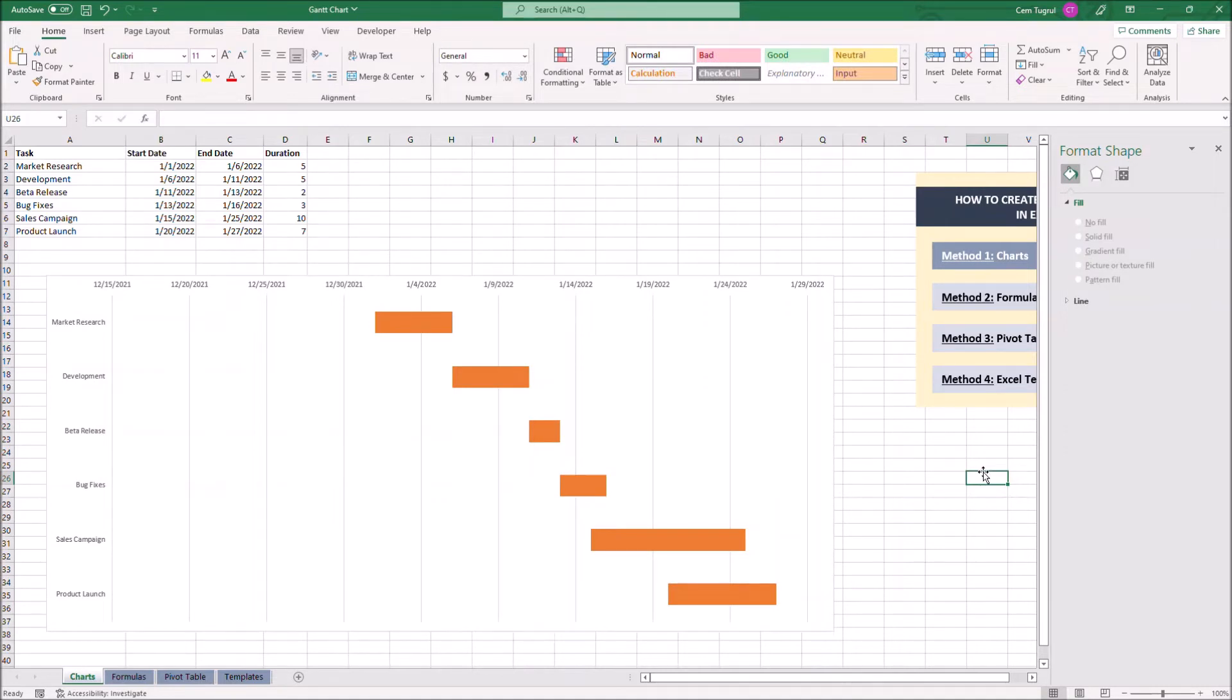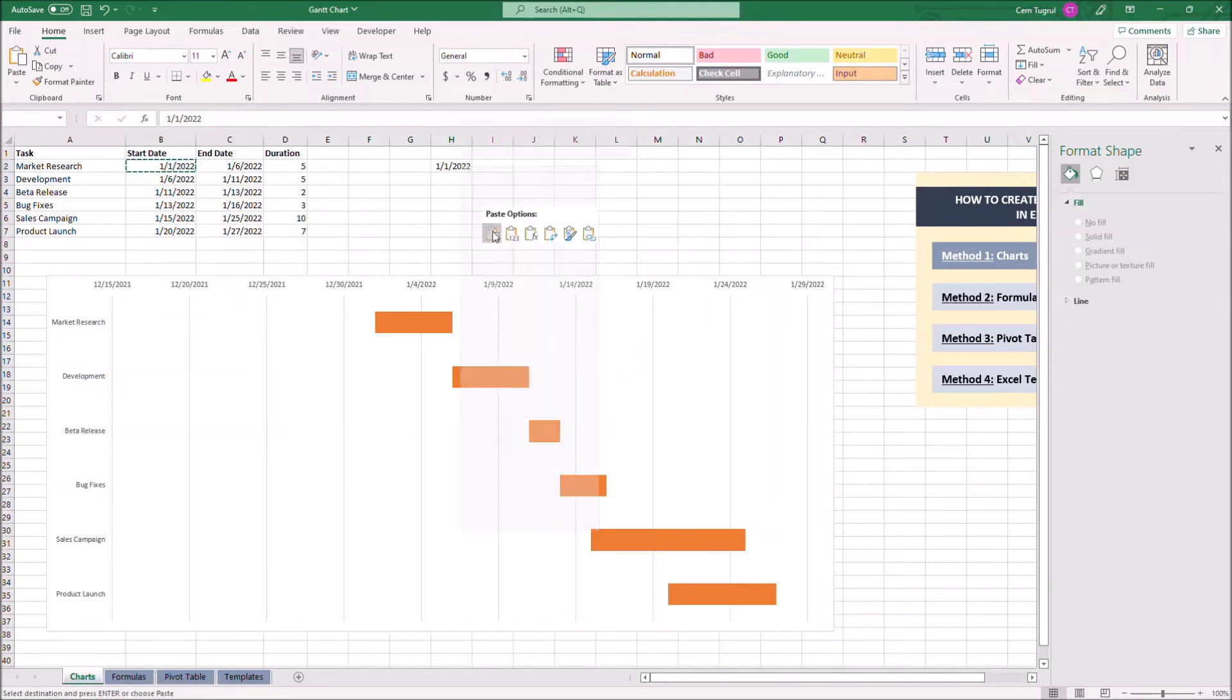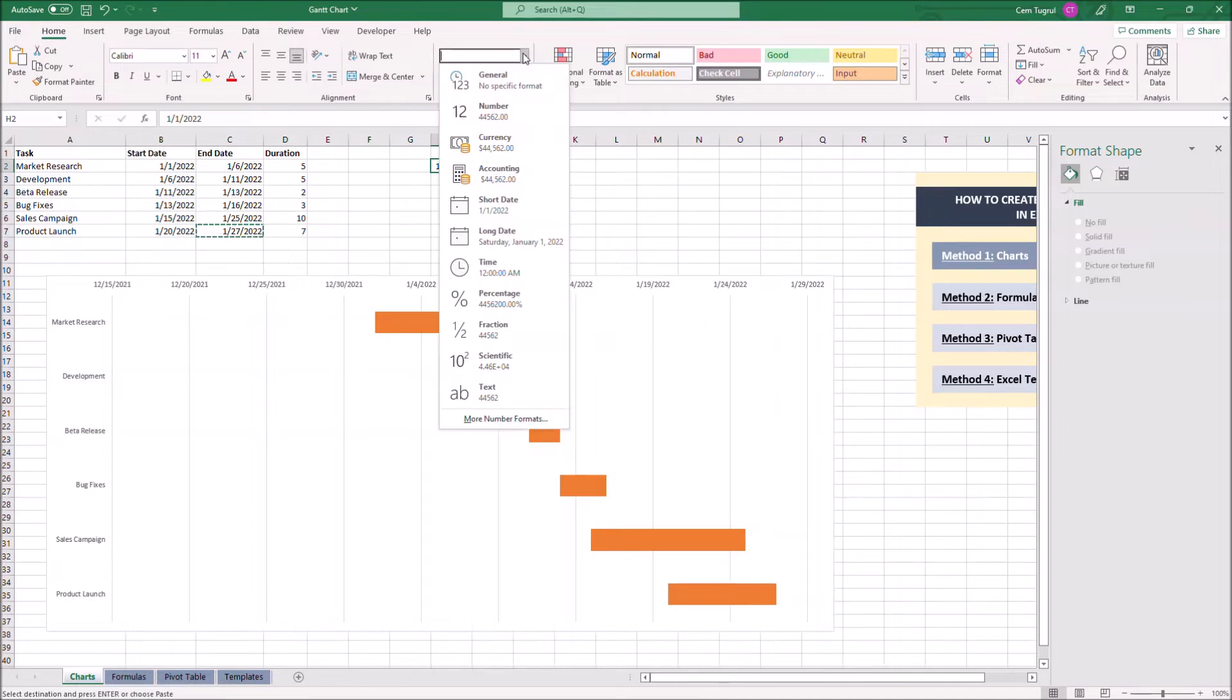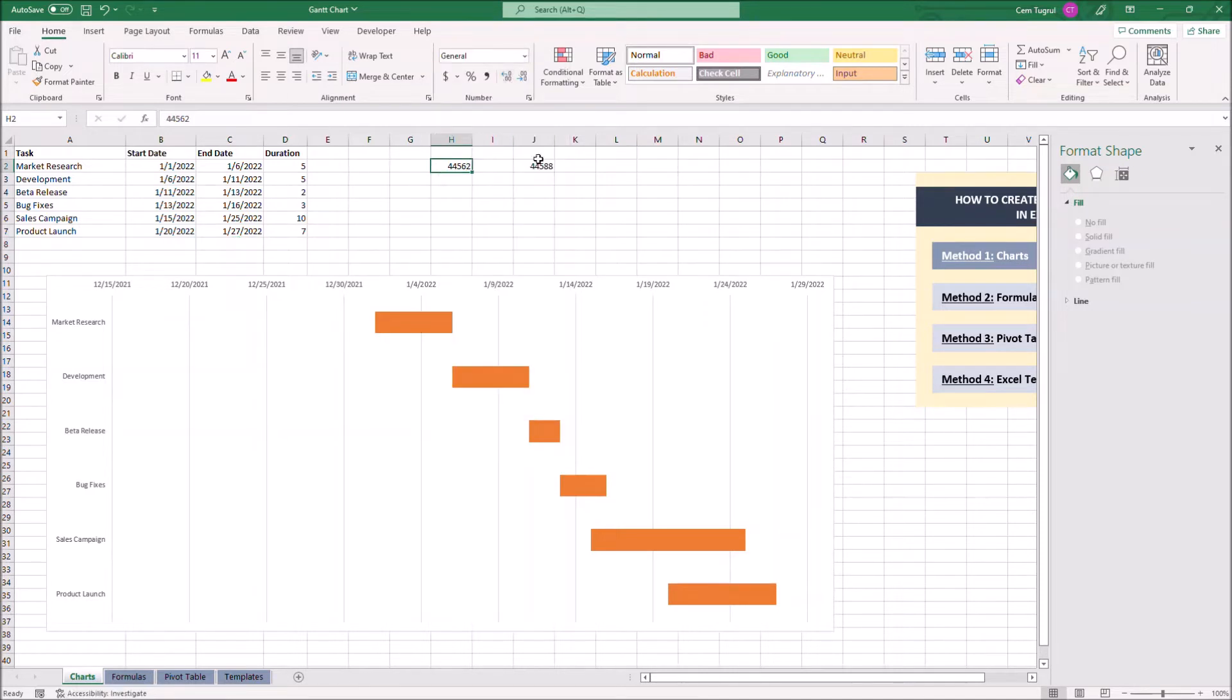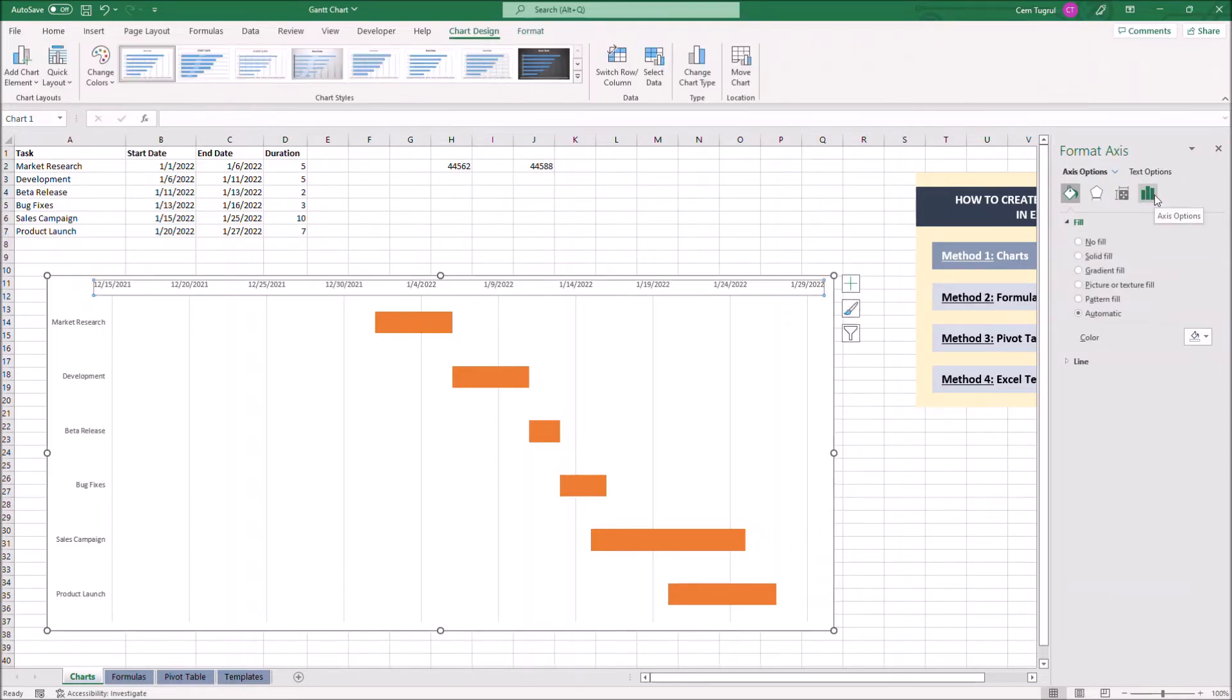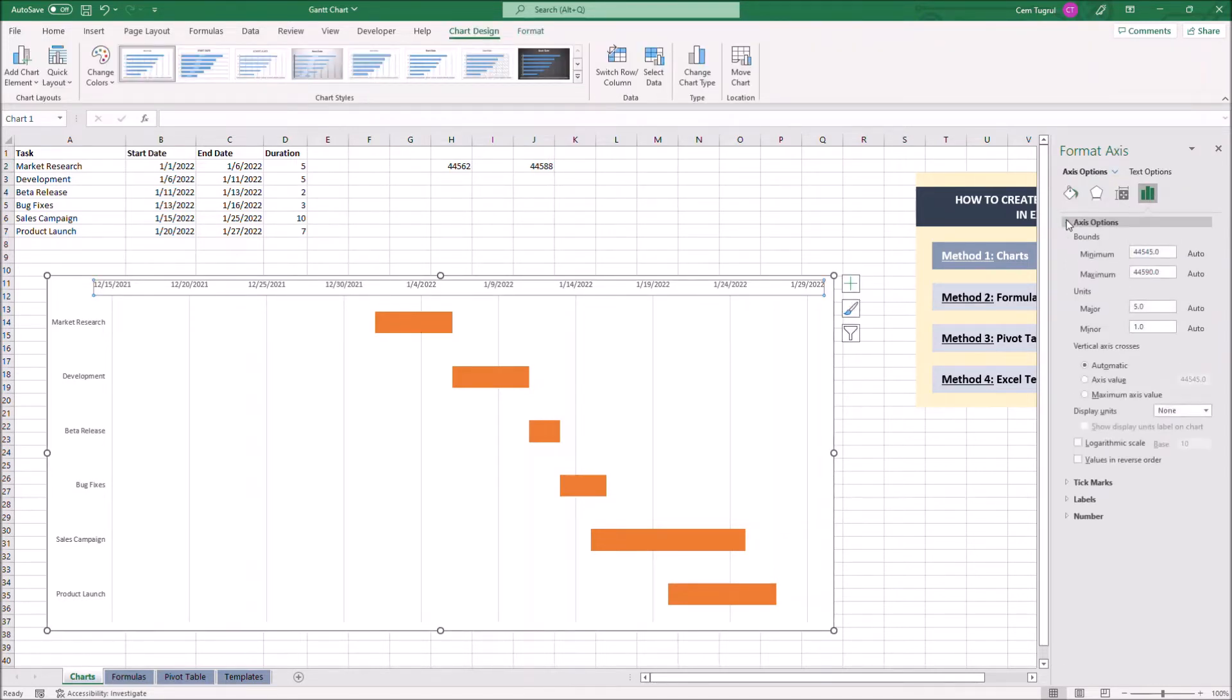We can adjust the date range according to our start and end date. All we have to do is to take our earliest and latest date and change the formatting to general. Now let's click on the date range and click on axis options. Now we can write these values to minimum and maximum.